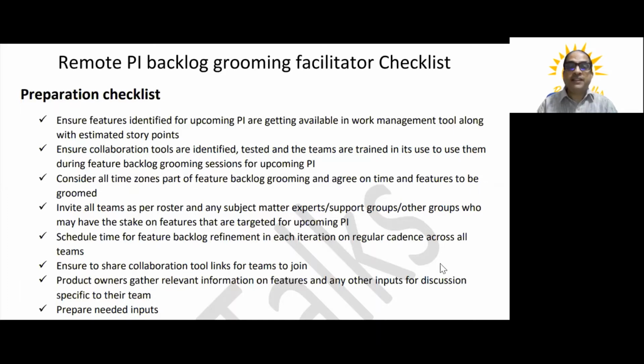In the preparations checklist, ensure that the features identified for the upcoming PA are available in the work management tool along with estimated story points. Most importantly, the collaboration tools. Since we are working remotely and are distributed, it's important that team members are aware of the different collaboration tools that we use during the backlog grooming sessions. Since all the teams are dispersed across the globe, we need to agree on time zones which are comfortable to each and every resource on the team. And we need to ensure that we invite all the critical stakeholders to the meeting. The reason being,